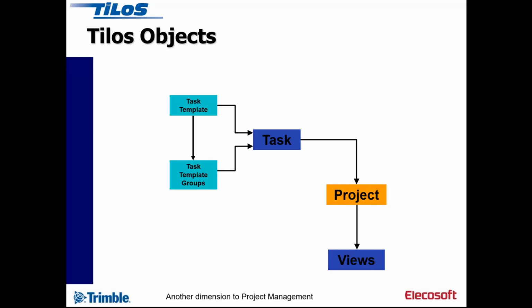So this is like a library, and the nearest thing in P6 are activity codes, but a library of processes to which we can give a shape and a color. So if I create a task template called drains and I say it's a yellow rectangle, I choose what task template I'm going to use when I either create it or import it, and it will appear as a yellow rectangle. So we need one reference to what the task template is.